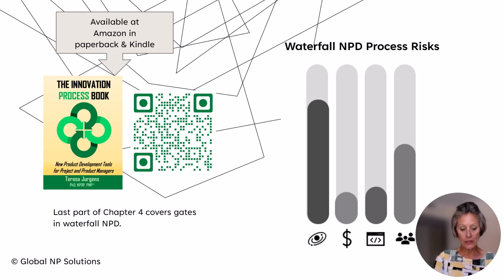Detailed to advance the project telescopes to narrower ranges of data accuracy as the new product advances systematically through the staged and gated process. A set of generic decision criteria for project gates is outlined for the waterfall process and maintained by the process owner. Gatekeepers are trained on evaluating these criteria for each individual project. We recommend that gatekeeper training include a benchmarking exercise to ensure consistency among gatekeepers and to establish guidelines for decisions, such as those shown in Figure 3-4 for profit potential. Some typical gate criteria used within an NPD process are listed below.